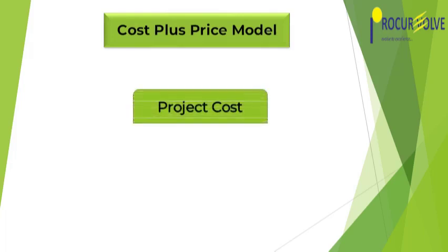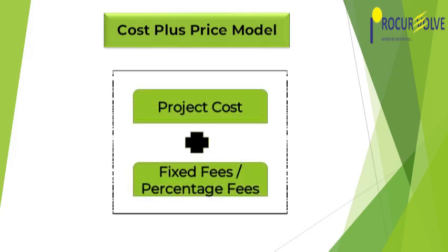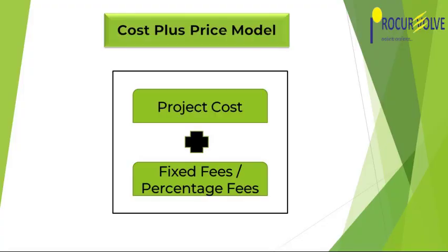So now in cost plus contract, whatever cost has been incurred by the contractor in procuring material, in designing, in executing work at the site, whatever manpower cost, whatever material cost actually incurred by them will become the base cost, and on this base cost the contractor will agree either a fixed amount or a fixed percentage which the owner organization, the project developer organization will pay to the contractor. So it is called cost plus model of the contracting.